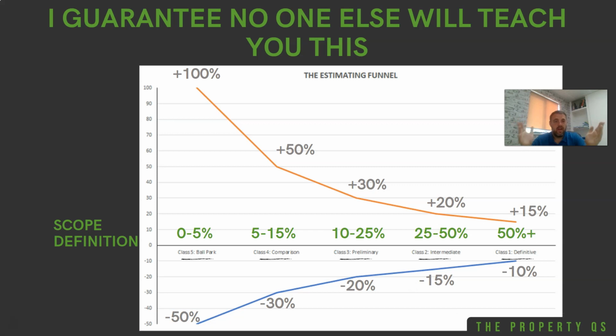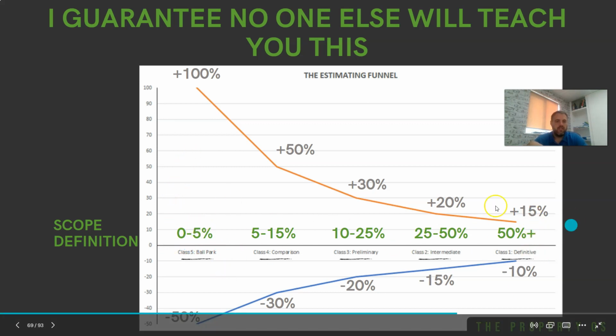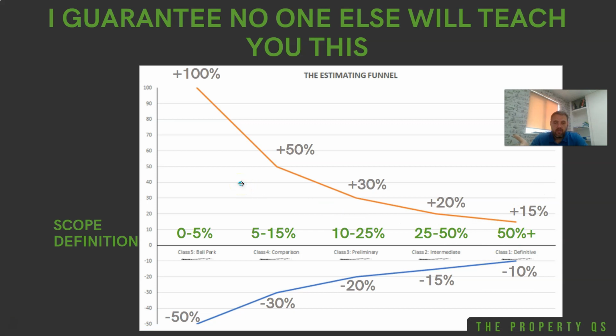Okay, well that's our first video about explaining why everybody's estimates are usually wrong from the beginning, because they're here and they're trying to get an estimate here, and it just leads to it being accurately wrong, which means you're trying to force detail that you haven't got, and then because you'll have missed something, it makes your estimate accurately wrong, because you've tried to be too accurate, but it's wrong. You're better being broadly right. Estimating in big chunks so that you've got some buffers built into the cost. That doesn't mean over-egging the cost. That just means making sure there's buffers for the unforeseen things that are going to be in your project.